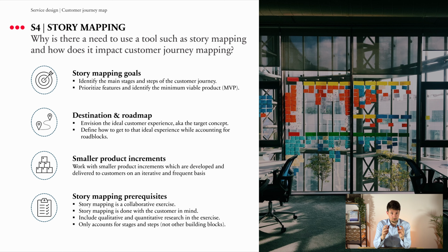The next prerequisite in story mapping is to always have the customer journey on your mind. However, you don't have to bring real customers in, since you have something that closely resembles one. Of course, I'm talking about the persona. So don't forget to bring in the persona to the workshops and make sure that everybody is aware of its characteristics. Another prerequisite is to include qualitative and quantitative research data in the exercise where possible. Remember that research-based customer journeys are preferred above assumption-based customer journeys. If you have data that you can share with the participants of the workshop, you should definitely do so. It will only improve the quality of the exercise.